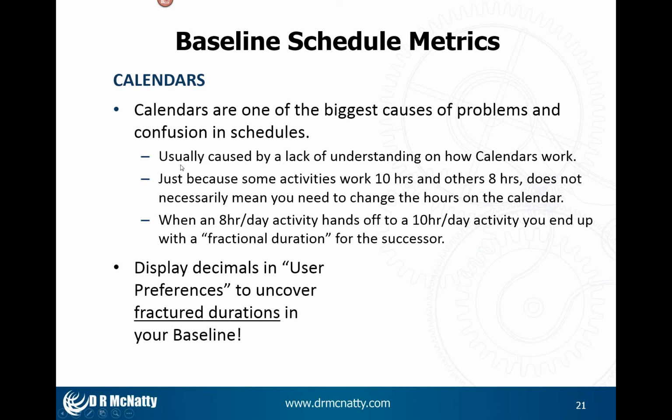So you need to be aware of how calendars work within the scheduling tool you're using. The other thing I see is even though a schedule is not resource loaded, people will change their calendars to 10-hour days and 8-hour days. But if you're not resource loading a schedule, a day is a day. It really doesn't matter to the scheduling tool whether it's an 8-hour day, a 4-hour day, or a 10-hour day.